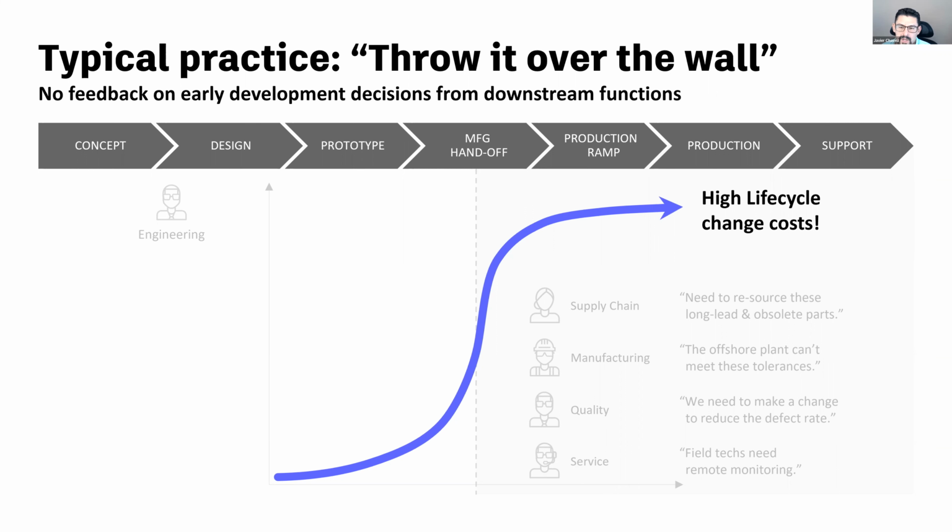And as a result, when purchasing is trying to source components, et cetera, and maybe has a change for you as a result of sourcing, now you've got to go back to product development and make a change to the part just because we can't source it. Part numbers, maybe it's a completely different component, you have to change your design. So these changes add up at the end. That's a much higher cost that happens late in the game here. So problems that we could have identified and fixed earlier are uncovered later, right?